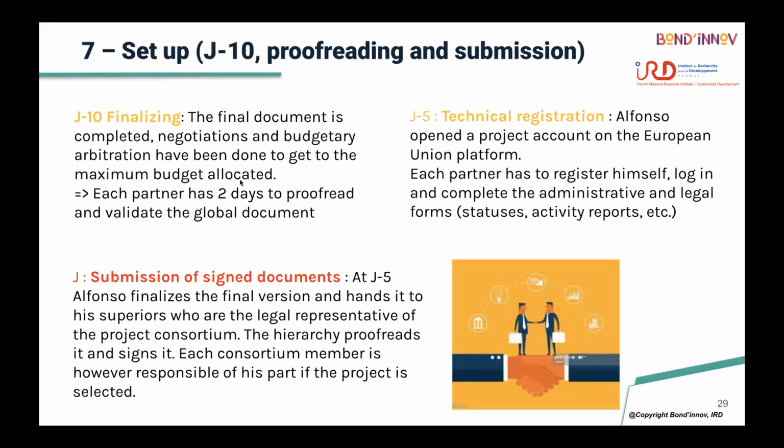It's not because you are responsible for work package one that you don't care about work package 5, because you can have dependencies between work packages.